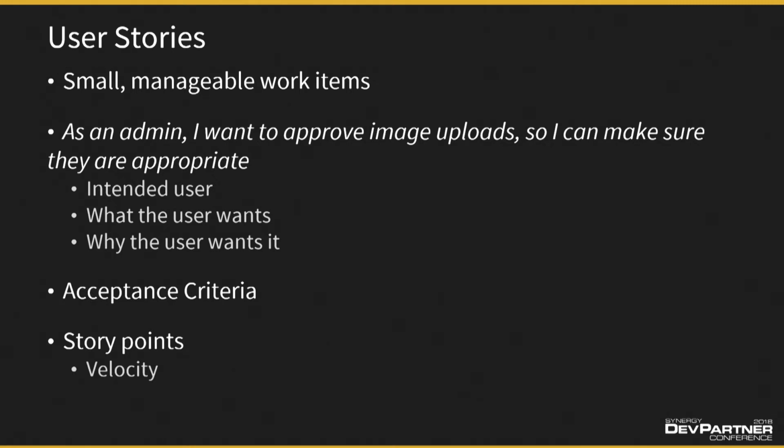In a user story, you should describe the requirement using language that is easy to understand. Describe who the user is that will benefit from the functionality. Describe what functionality the user is looking for. Describe why the user wants the functionality to better ensure that functionality is what the user expects. User stories should always include acceptance criteria. This dictates that work must be accomplished for the requirement to be seen as done or accepted. Acceptance criteria is a solid foundation for your test cases.